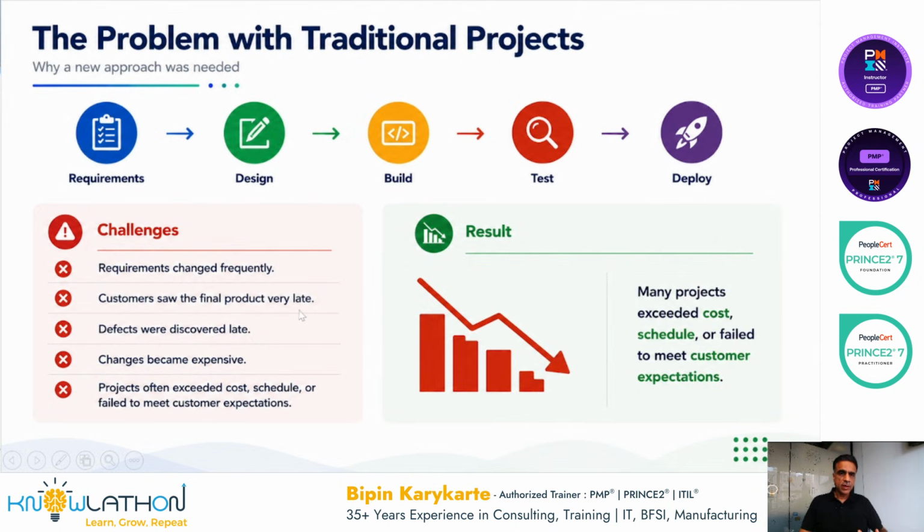Customers saw the final product also very late, right? Customers used to see the product only after the testing had started. So we have completed the requirement, we have completed the design, we have completed the build. So almost 3/5 of the project is already done, already completed. And then the customer will actually see something with their own eyes.